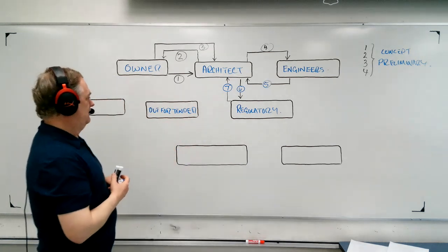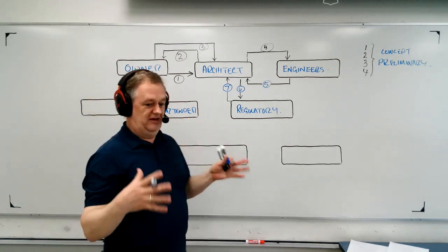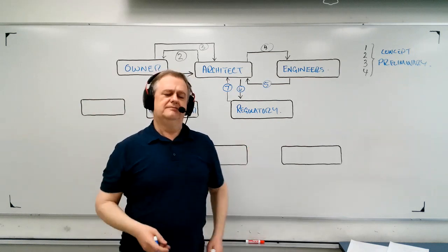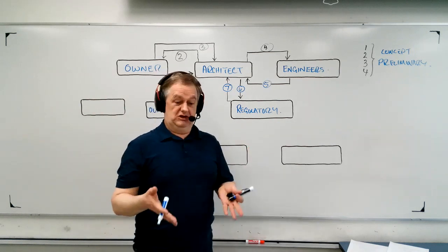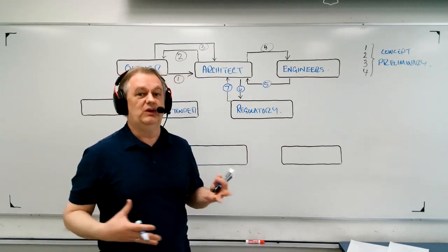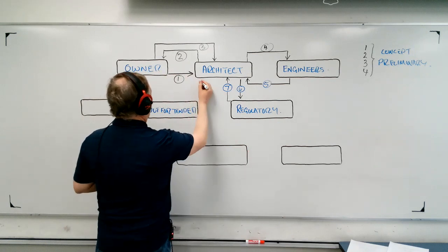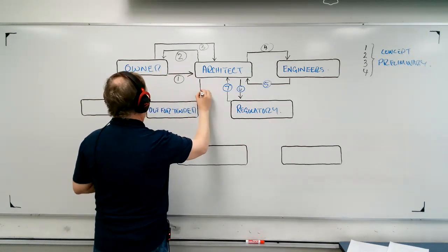So what we want is we're going to take a nice big package of all of the documents. We're going to give it to a bunch of different people and say, how much is this going to cost, and can you do it? Are you capable of doing this size of project? And so this step would be step number 8 right here.